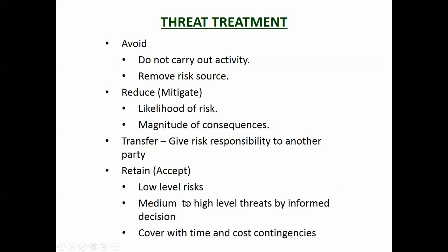Or you retain, you accept it. So low level risks, you accept them. Medium to high level threats, by informed decision. There are some things where you do as much as you possibly can and it would still be regarded as high level risk. For example, tunnelling. Whatever you do, and they take all sorts of precautions, tunnelling is still a hazardous occupation. You'll take every step you can to make it safe, but tunnelling and mining are still going to be quite dangerous. And so it's accepted by informed decision, and that is very much the least favoured option. That is only what you do as the last recourse. In fact, you would consider very carefully whether you're going to carry out that activity or not, if you have to retain it.